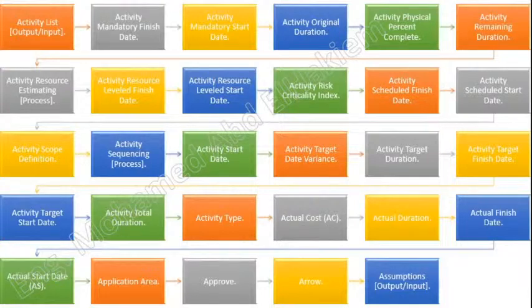The length of the arrow does not represent the expected duration of the schedule activity. Schedule activities are connected at points called nodes, usually drawn as small circles, to illustrate the sequence in which the schedule activities are expected to be performed. See also Precedence Diagramming Method, PDM.